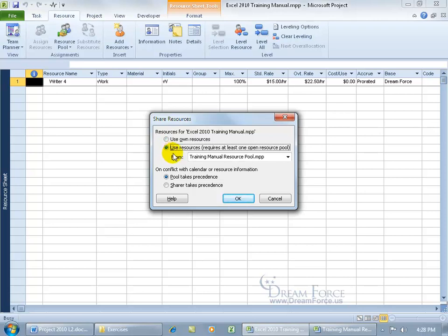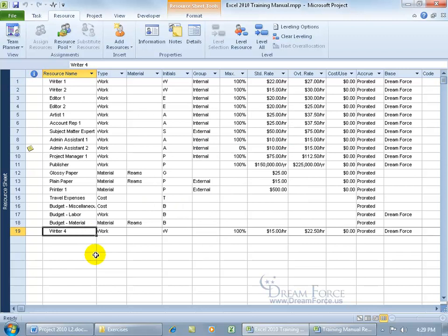Now that the resource pool is open, go back to the Excel project, click the Resource Pool drop-down arrow, click Share Resources — there you go. Now we get the option to use resources from the Training Manual resource pool. Before clicking OK, note the conflict precedence option: pool or sharer. I recommend letting the pool take precedence when sharing with other projects, unless your project is more important. Click OK — Writer 4 is still there, and all the other resources from the pool have been brought in as well.